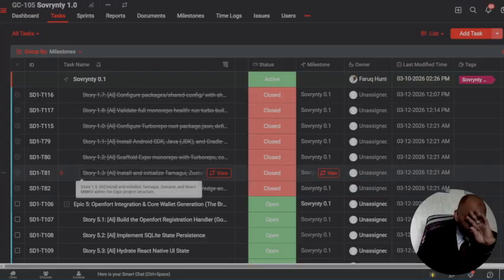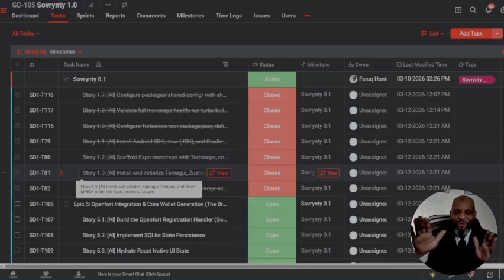And listen, the discipline to know to build the traceability matrix is key. If you don't have that, I will tell you this is a particular project management trick, but the traceability matrix basically means that we can map one thing to another. I understand that I'm releasing 0.1. I know that in that there are epics 1, 2, 3, 4, 5, 6, 7. In the 7 milestones, each one has several tasks. Would be 1.7, 1.0, 1.1, 1.2.